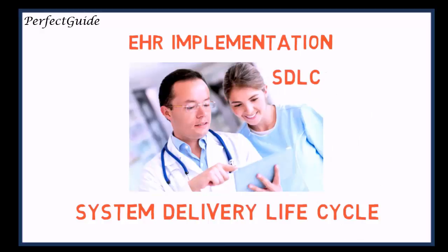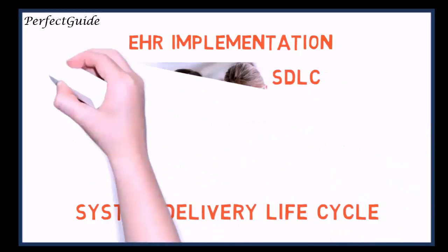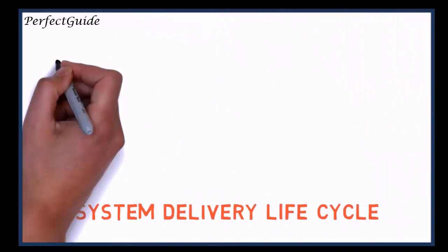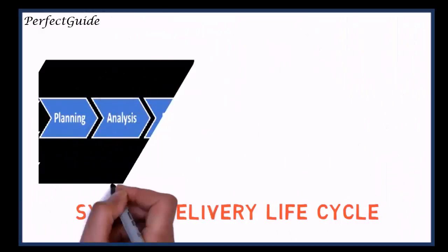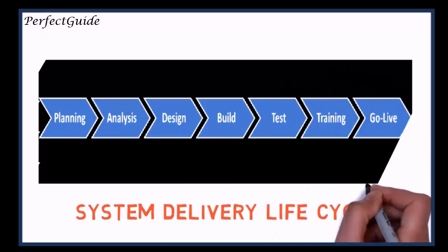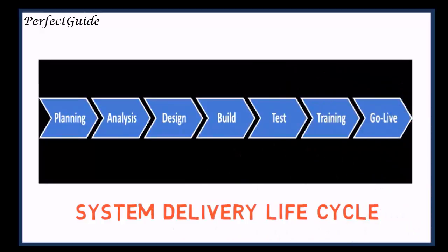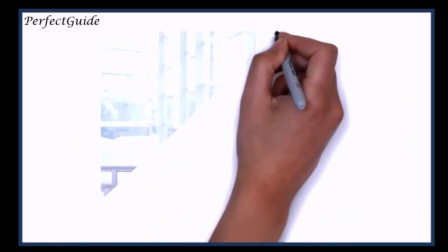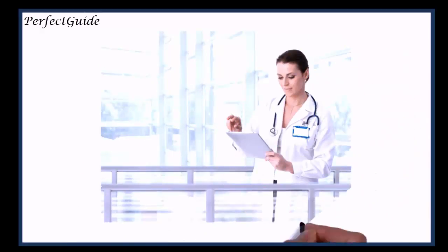The SDLC method guides an EHR project from the initial stages of the project, developed by the project leaders, through a feasibility study, systems analysis and design, the build, testing, training, go-live, and post-go-live analysis. Documentation developed during the project is invaluable later, when the system is reassessed for upgrades to new versions or code.